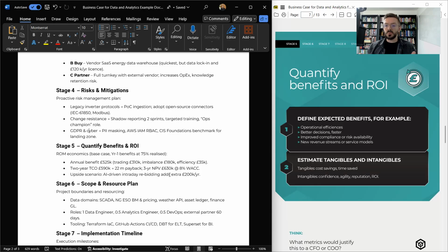If you don't know the numbers, make some sensible numbers up, highlight the fact that they're estimates, and show all of your working. I think this is really powerful. Just show the calculation, produce a calculator spreadsheet or whatever that says, this is how I came to the ROI, but by the way, 4 of the 10 numbers are just guesswork based on my gut feel. That gives your stakeholder the chance to have a rummage and really feel, do I like this? And oh no, I think that's different. What happens? And scenario plan.